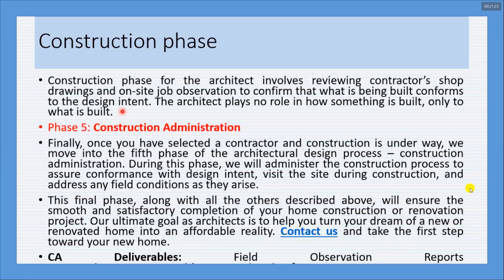So the construction phase for the architect involves reviewing contractors' bidding drawings or shop drawings and on-site observation to confirm that what is being built conforms to the design intent. The architects play no role in how something is built, only in what is actually built. So finally, we are moving towards the last phase, that is construction administration.